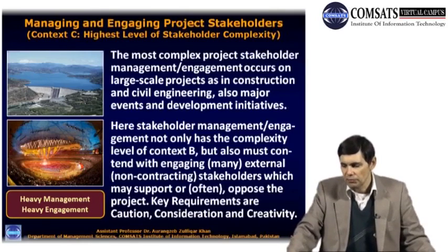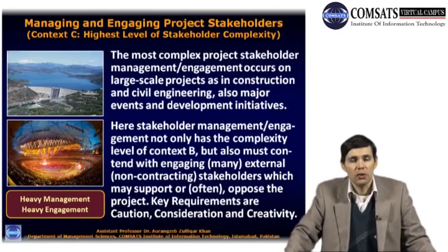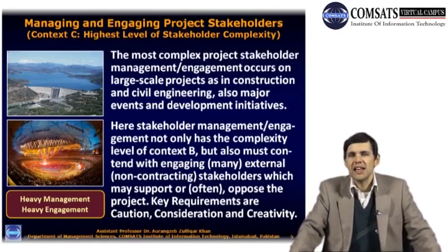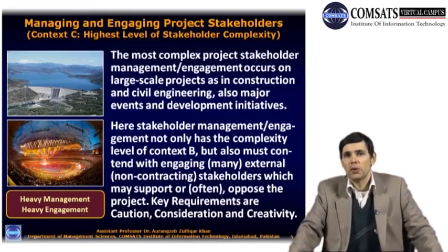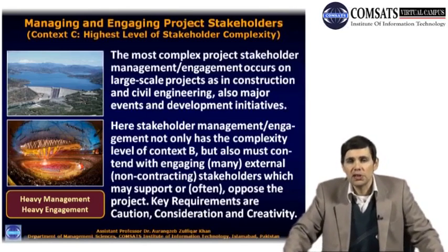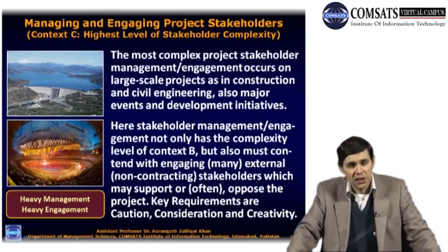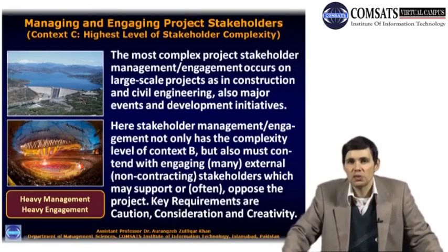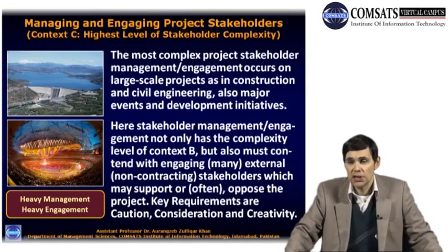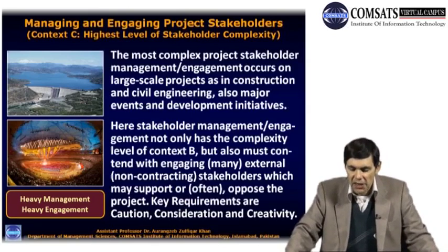financiers, and so forth, but you would also be having a lot of stakeholders who might not be particularly enthusiastic about the idea. For example, environmentalists, non-government organizations, local communities of people who may be displaced by the project and who would have to be resettled elsewhere, and so forth. These are stakeholders which might not be very happy about your project and which would work against it. And there are many examples worldwide of such things taking place.